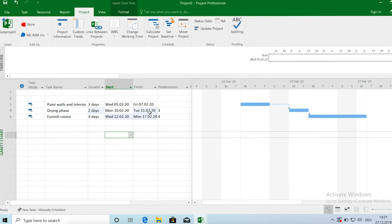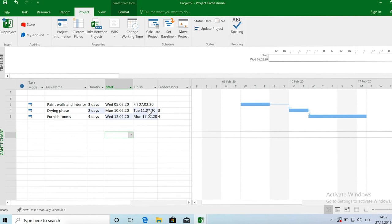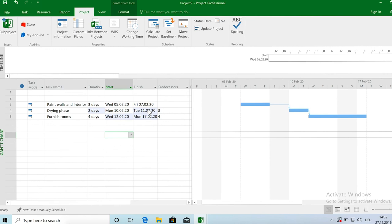Also, and this is more advanced, we're not gonna look at this here but I just wanna tell you, you can also plan resources in Microsoft project which means team members and machines which are dedicating their labor to the project. And in the automatic scheduling mode Microsoft project will automatically consider the availability of resources and extend or schedule the tasks based on the availability of team members. So let's say if a team member is only available 50% instead of 100% then the task duration will double. Because the team member can only work 50% of his or her time on the project. So this is all in the background Microsoft project will automatically schedule your project with respect to those constraints.